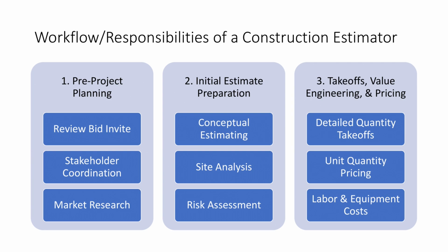So they have to do market research in India or Mexico or other countries to see what's going on over there, and that informs their estimate. So if the project site is not local, you have to do market research to understand the cost of labor, material, and equipment in other parts of the country or other countries as well. And then you start with conceptual estimating, site analysis, risk assessments, and then you do detailed quantity takeoff. So you have the construction drawings, you do detailed quantity takeoffs, and then you assign prices that you got from your market research.